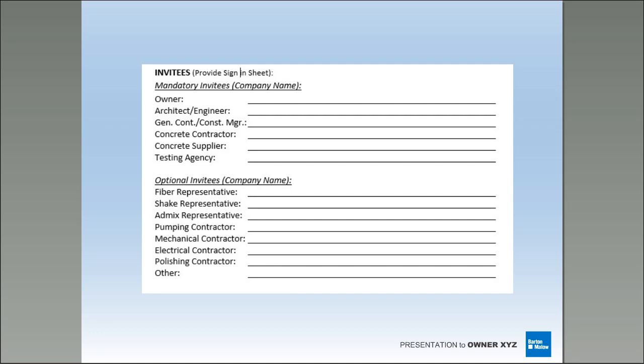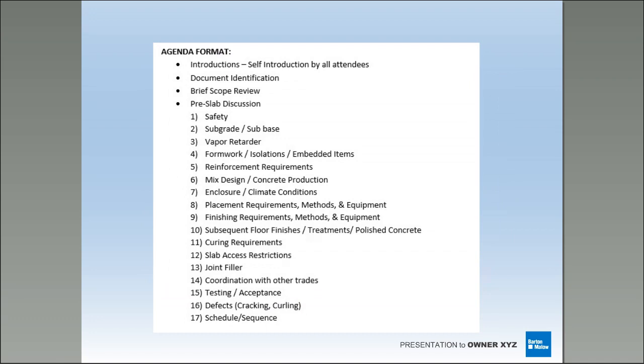I would suggest having this meeting, you don't want to do it the day before placement. If anything, you want to do this at least a minimum of 2 weeks before you're going to do your first test placement. It's going to give you that time frame because there are going to be things that come up that you're going to have to dig into, roll up your sleeves and get to work on. So I would advise a 2-week duration so you can revise some things and come to a consensus for success.